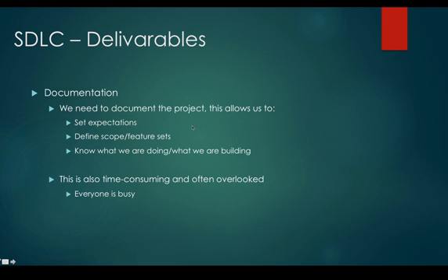It drives my feature sets. Maybe I will develop X, Y, and Z, and I'll deliver one in 3 months, the second in 5 months, and the third in 6 months. For our teams, it helps us as managers understand what's expected of us, so that we can break those things down, put them into feature sets, and then assign them to the team members. And then it hopefully communicates clearly to them what they're expected to build. We've set expectations, we've defined scope, so hopefully it can trickle down to them so they know exactly what's expected of them.